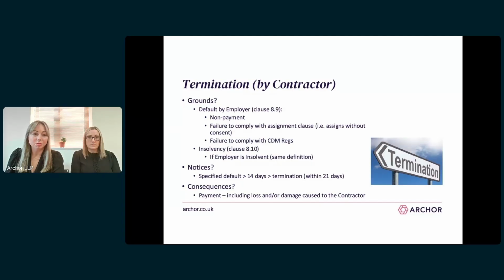So this is a really important clause to work out where you go if a contractor has terminated. The contractor is firstly required to remove or procure the removal from site of all temporary buildings, plant, tools, etc. He's supposed to do this with all reasonable dispatch, whatever that means. The contractor also needs to provide all as-built drawings so far as these have been prepared.